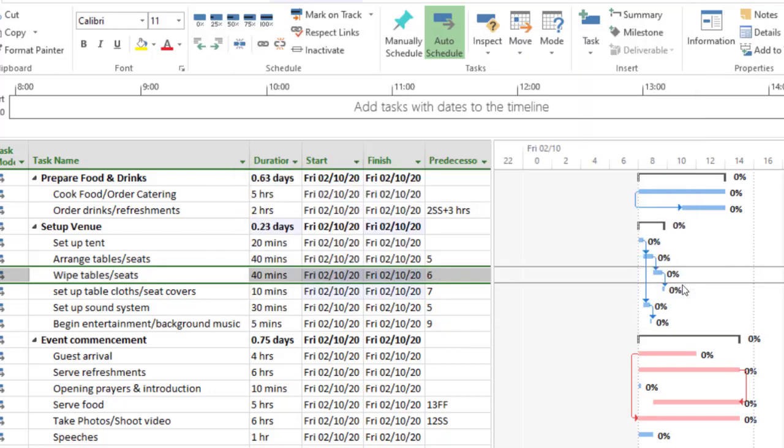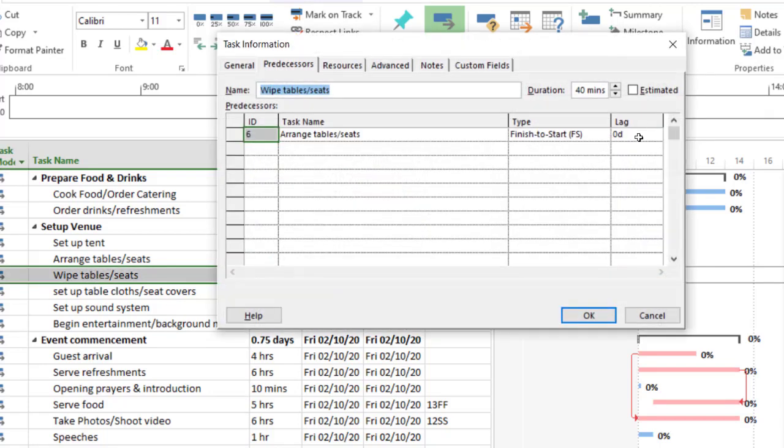Click on OK. Now notice what happens. So here we're actually losing some time. Now to gain back that time, what you do is go back. Then you enter a lead time of 40 minutes. Or maybe even 30, whichever. So if you want to take it back exactly to what it was, you enter a value of -40 here, -40. Then you ensure that this is in minutes.